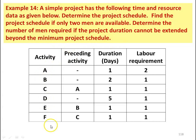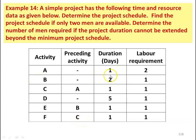There are six activities: A, B, C, D, E, and F. Activities A, B, and D are the initial activities with no preceding activities. For activity C, the preceding activity is A. For activity E, the preceding activity is B. For activity F, the preceding activity is C. The duration for each activity in number of days is: 1, 2, 1, 5, 1, and 1. Labor required: for activity A, two labors are required; for all the other activities, one labor is required.